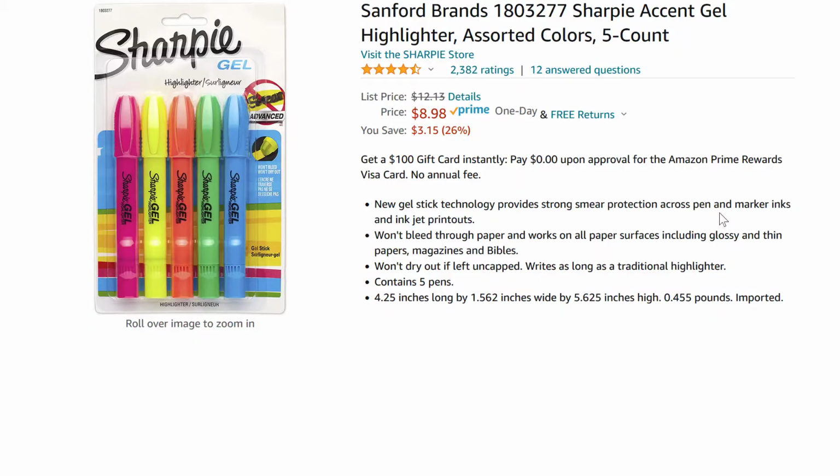Okay, let's get into this thing. Let's start off with highlighters. The first thing you should do before compiling any type of estimate is to read the entire set of drawings. And if there's a spec book, you need to read the electrical specifications as well.